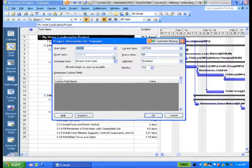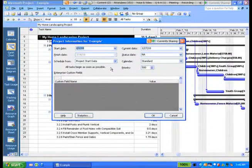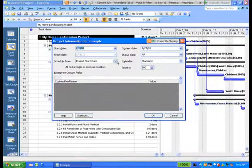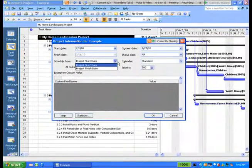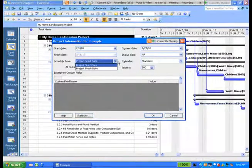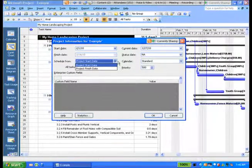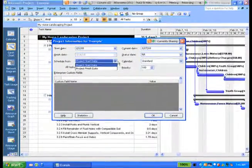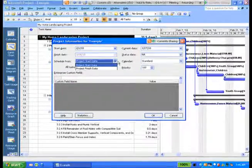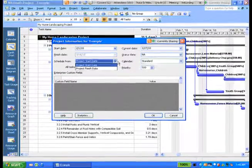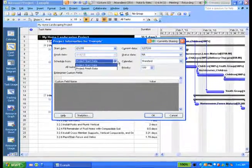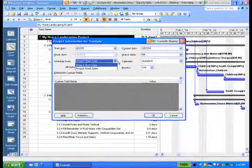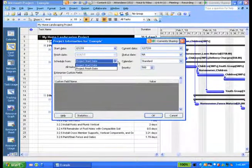The third field down is schedule from. This tells project whether it should schedule from the start to the finish of the project based on sequencing and based on any constraints that might be in the project. This is the default in the tool, and I heartily recommend that you leave it at project start date. When project is scheduling from the beginning, it tries to schedule tasks to start as soon as they possibly can.